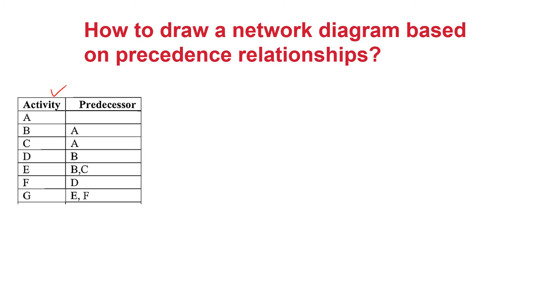I will just give you an illustration. So as we discussed the first activity in any project is often the milestone activity which indicates start of the project. Now here once the project is started the first activity which has got no predecessor is activity A. So right happening at the beginning of the project.